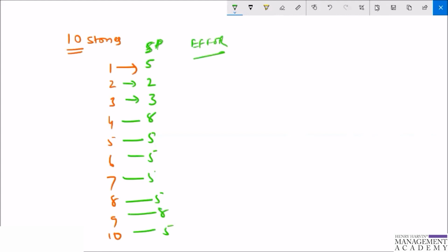Say suppose this is the very first iteration they are working upon. So which means 5, 7, 3, 10, 18, 23, 28, 32, 37, 44, and 49. Say approximately 50 story points of work. Which means this team can work 50 story points in one sprint. So this is sprint number 1, say.